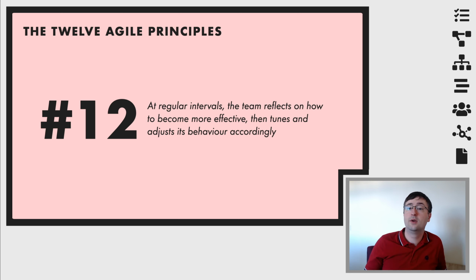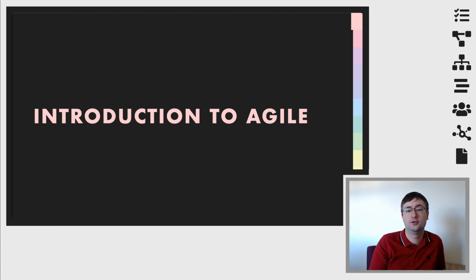What did we do really well as a team? What didn't go so well? How can we improve that for next time? And it's these retrospectives that give the team an opportunity to come together, not to pass blame, but to look for opportunities to improve in the future.